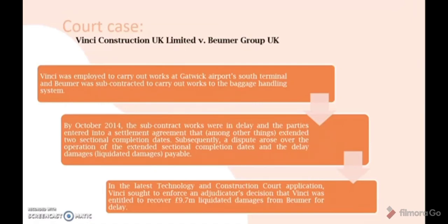payable. As the decision, in the latest Technology and Construction Court application, Vinci sought to enforce an adjudicator's decision that Vinci was entitled to recover 9.7 million sterling liquidated damages from Bumer for the delay caused by Bumer.